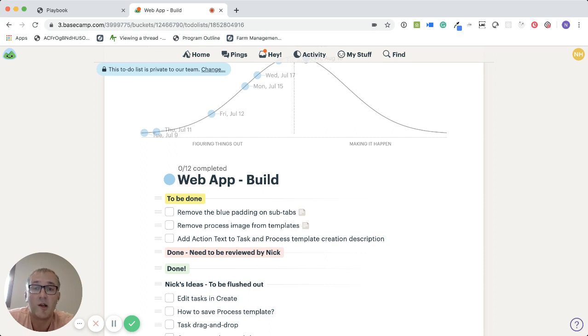And so, we had a lot of stuff to do, and a lot of it is, I'm going to have to pick what is required, what is optional, and start to build up multiple checklists: here's where we need to be by day 100, and here's where we need to be by, say, day 125. And then decide what we can do to fit the scope of our next 52 days into 52 days. So we need to fit the scope into the 100-day deadline.